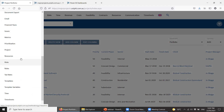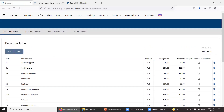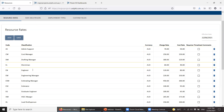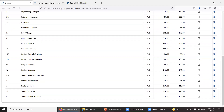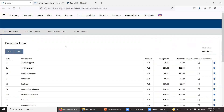If I scroll down to Resources — sorry, I just got a text I had to check — when you go into the Resources module of the configuration you've got Resource Rates and a column called Classification. In Unify there are two types of roles: a role on the job, such as job captain or project lead, and a role in the company — draftsman, senior project manager, quantity surveyor. You can completely make up whatever they are. You can put a sell rate and a cost rate into the system, and those charge rates build up your price for the estimate. You don't need to know who is going to do the job; you just use these classifications.